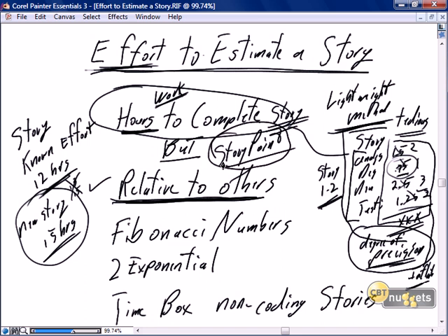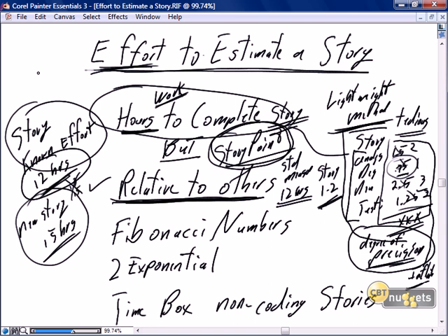And we'll discuss what a story point really is in more detail in just a moment, but a story point is that standard measure. I.e., a story point could be equivalent of 12 hours. So we say this story with the known effort is one story point. And if we look at the next story and we say it's a little bit bigger, it may be 1.5 story points, for example. The problem with that, again, is we get into more implied degree of precision.